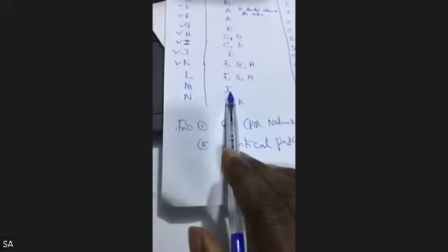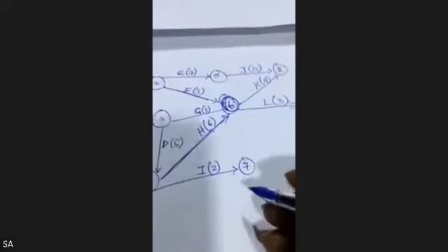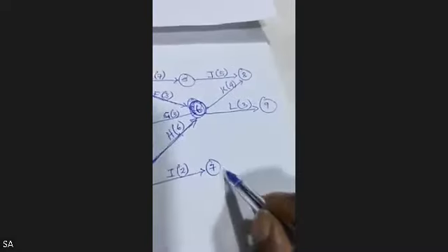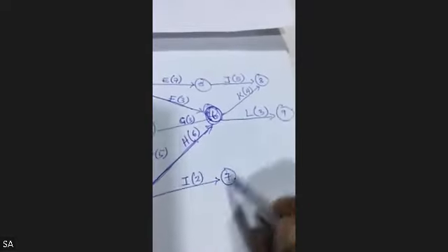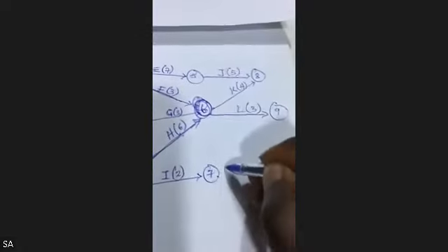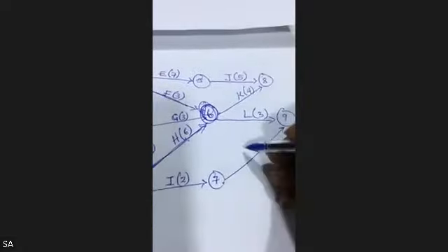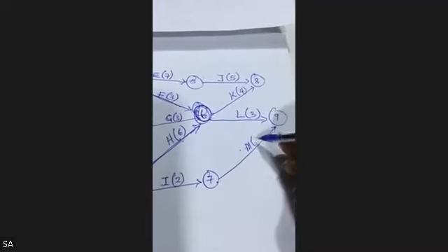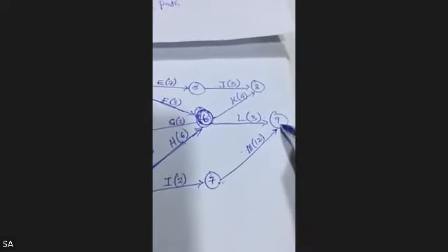M is an ending activity. M must happen after I must have happened. This point is very, very important. M starts where I end. So you will not ask yourself, should my M go this way or that way? No, because L is a terminal or ending activity. Your I goes to node 9. So this is M. What is M? 12. So M goes to the terminal activity, which is node 9.